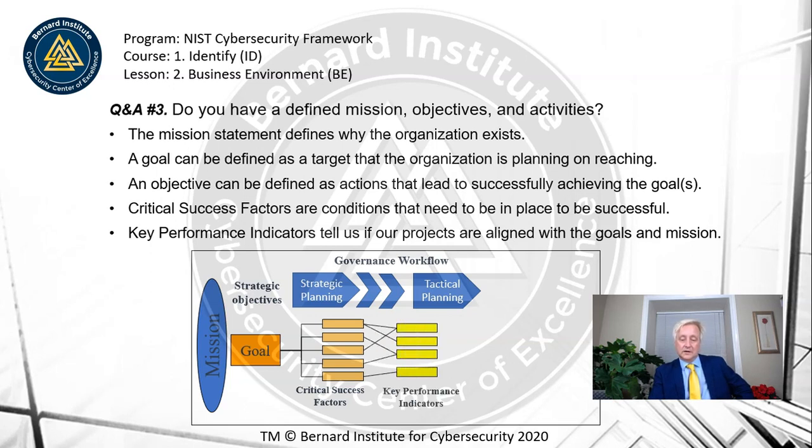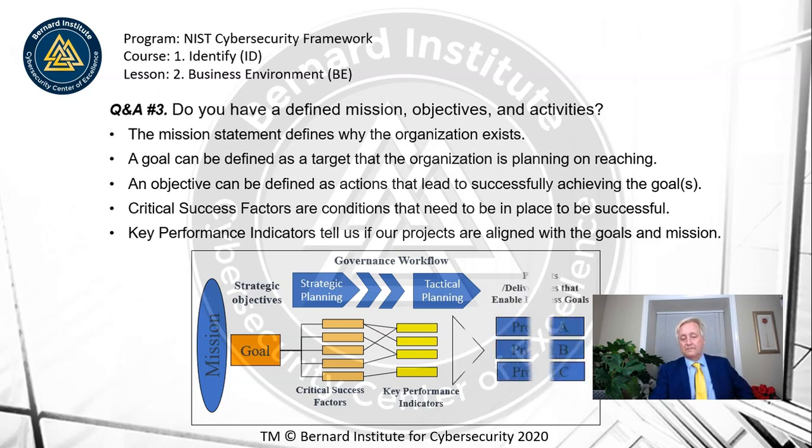And then the KPIs. So the key performance indicators help to keep the project online. And again, performance indicators, you can have as many as you need. There should be performance indicators for important critical parts of your project so that you know, for instance, KPI could be resource planning or resource management, right? You need to have resources in place, but if the resourcing hiring process or training process doesn't go as planned, then you need to identify that that's a problem and you need to do something, take some kind of course correction to get that back on track.